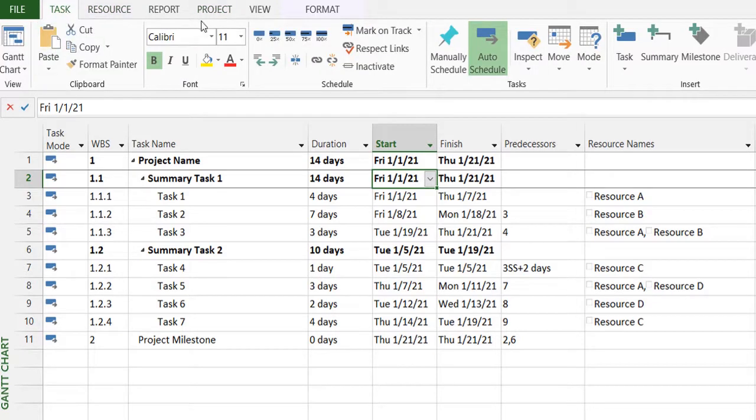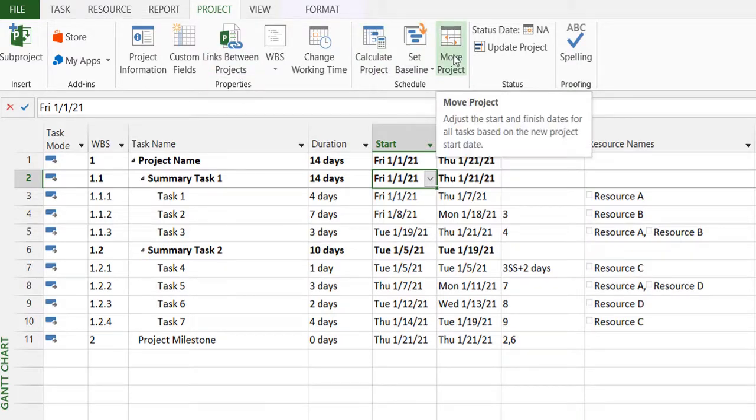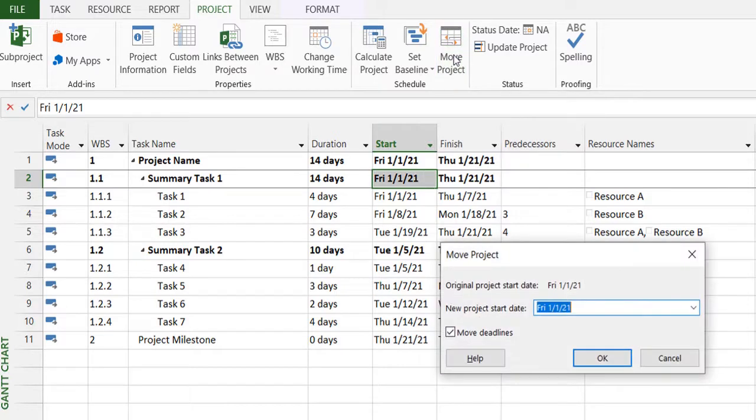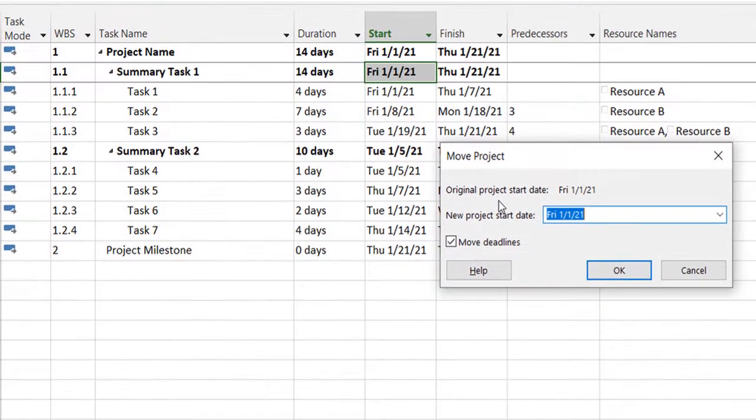Now we move on to the project tab and there's a move project option here. It will automatically move my entire project from the original project start date to the new project start date.